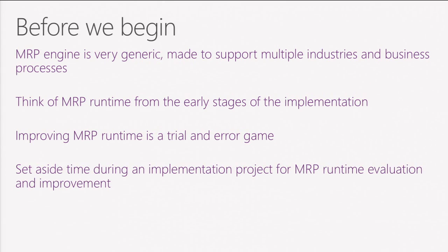Something else also related to a Dynamics CX implementation project: please set aside time during the implementation for evaluating and improving the MRP runs. So set a goal for your runtime. How long should it take based on your business processes? For example, if you know you need to replan twice a day, of course it cannot take longer than a couple of hours. And after you have set these goals, set aside time during the project to track against these goals.